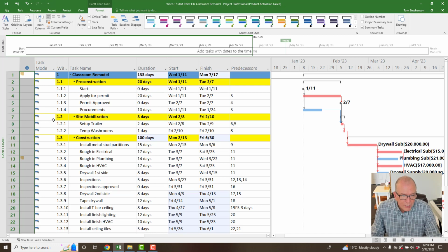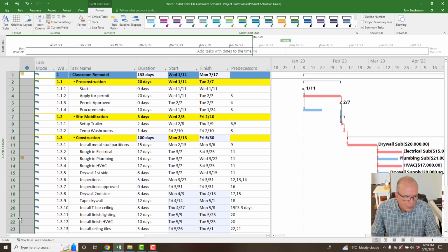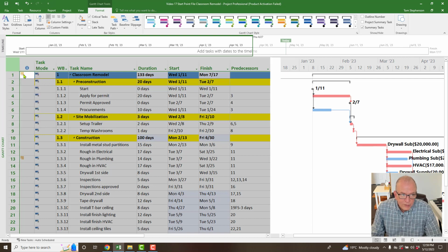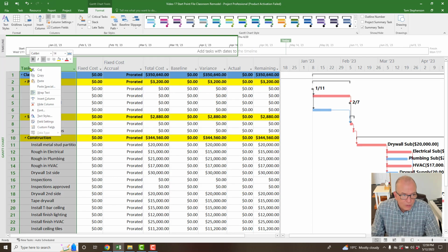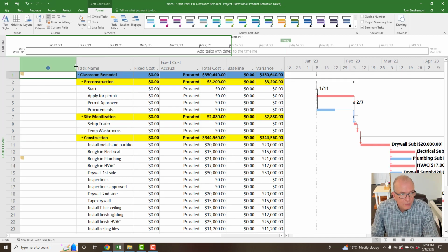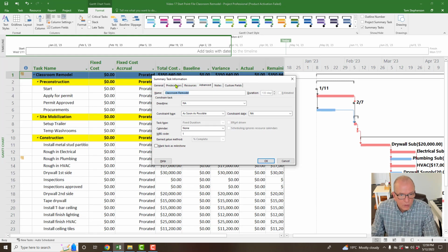This column, check it completely. Is there anything in this column that looks strange to you, like constraints, over allocations, or a special calendar? Look at it. It's called the indicator column. If you don't see it, it's only on the entry screen. If you want it in the cost screen, you can always insert it. You can go insert column, type I for indicators, and there it is. Voila. That's what we want to check there as well on the indicator columns.